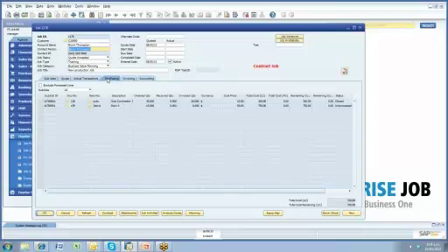So that may be an average cost, for example. But if I'm purchasing something specifically for a job, I will want the actual cost of that purchase on this job, because perhaps I had to air freight it in. Perhaps I had to buy it from a different supplier this time because I needed it quicker than the other supplier could give it to me, and the cost is different. So that will affect the profitability of this particular job, so I do want to keep those tied together.